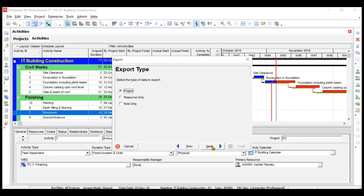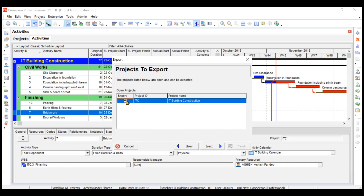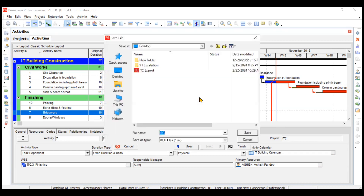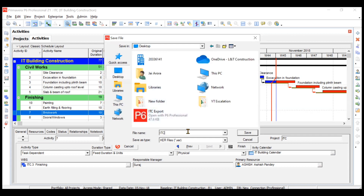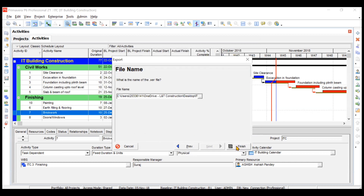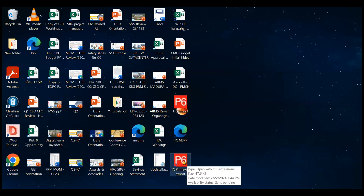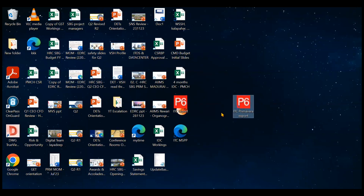Go to Next. If you have multiple projects open, you can pick the specific one you want to export. I want to export IT Building Construction, so I'll go to Next. You can choose the file name and location. I'll store it on my desktop and name it 'ITC Primavera Export'. The extension is .XER. I'll click Save, then Finish. The export is successful, and I can see the file on my desktop.